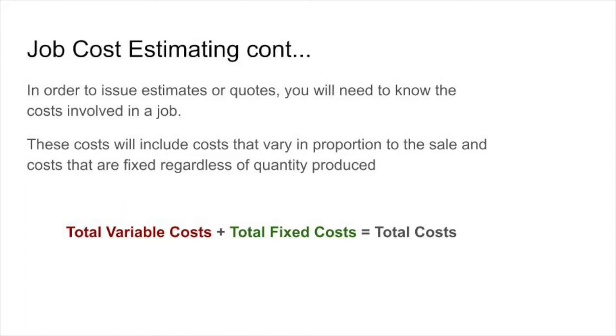If we think about variable costs, they change depending on how many units of something we produce, or how many gallons of paint we put on the wall, or how many hours it takes to paint the wall. Variable costs vary with the size of the project. Things like labor and units of raw material are all considered variable because they change depending on the size of the product.